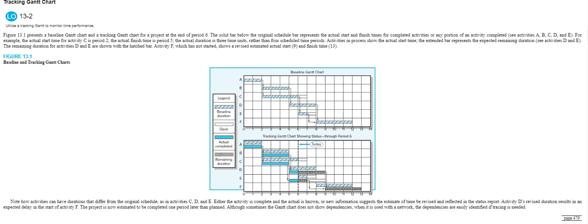Well, if you didn't stop the presses and put these informal requests through a formal process and didn't reset the baseline, now you can't really communicate what you originally agreed to versus what you're doing right now. So the project team has no one to blame but themselves. So for project reporting, and as you come to the end of the project schedule development process, set the baseline, make sure everyone knows what it is, use it as the basis of reporting, and make it the line in the sand beyond which any change must proceed through a formal change control process.